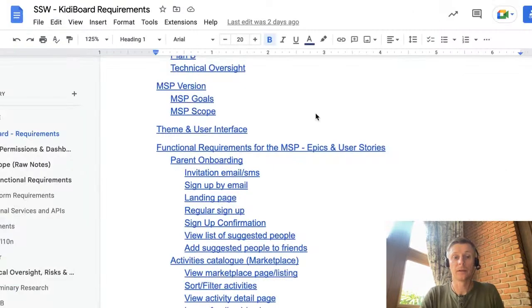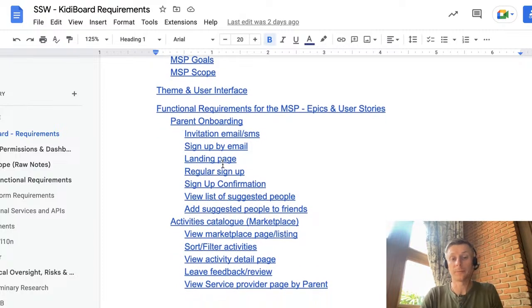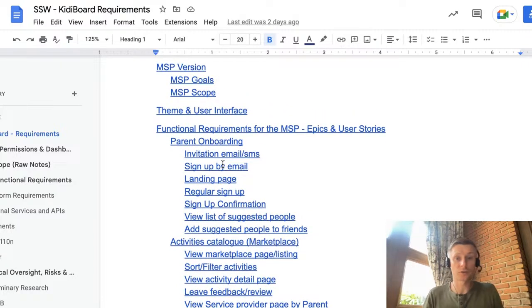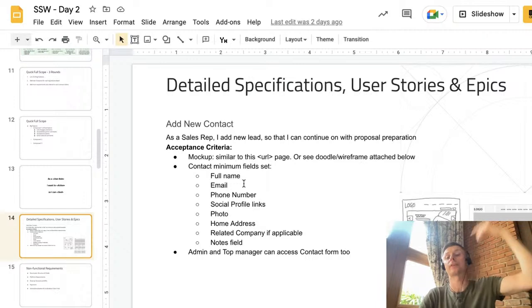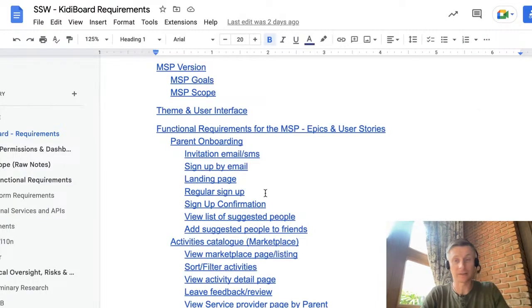And at the end, this is basically how we work on that. We have a list of all user stories, then we group them by epics, and only then we start converting them to this specific format. So basically we list high level, then break it down by sections, epics, and then start adding acceptance criteria, more clarification, one more round. So it's done in rounds. It's not just one time going and diving deeper. It's hard to put such a long and complex document together in one run. So usually the project manager plus business analyst do this in an iterative process, step by step.